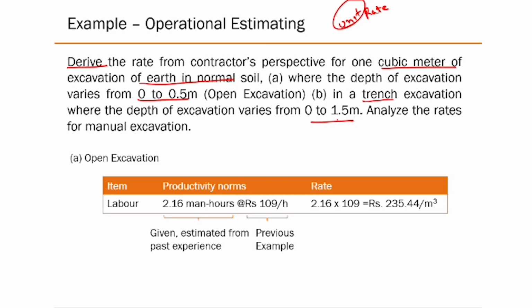So for excavation, what is the main cost you expect? Manpower or machinery. It could be machinery, it could be a manpower based job. What else? Conveyance charge, for what? The material that is coming out of the earth, you need to displace it because you can't keep just storing it sideways. So that requires some time, or some cost.